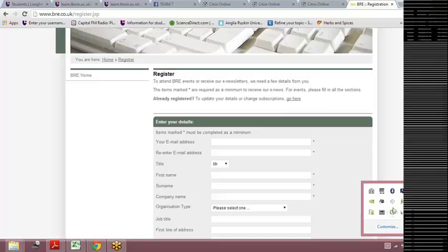This red circle symbolizes the overarching crane and its reach. The stationary crane will be right in the center, where the core that we're going to construct is. It is where the elevators are, and it's going to be universally accessible for all the students in the old building and the new extension building.